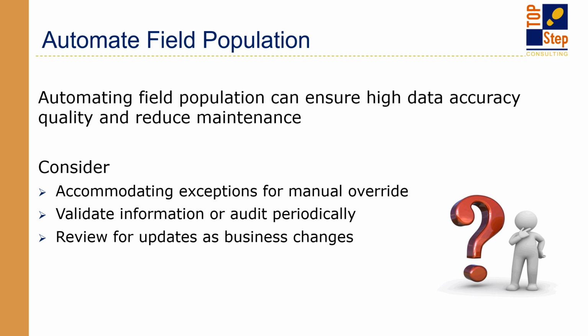Some of the examples that I've had with defaults are project status and project health, because it's set to green and nobody updates it. I've seen that happen a lot. You're looking at that and you're like, what in the world? I knew that the PM said that the client's upset about this, but it says that their health is green. It's because nobody has changed the default values. They just see it there and they're just like, oh, we're going to keep on going.